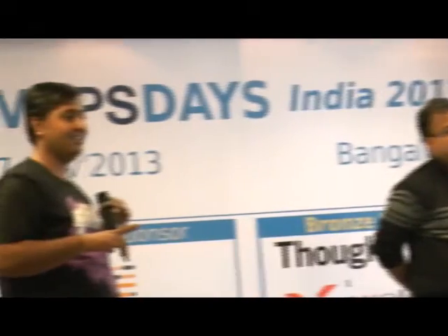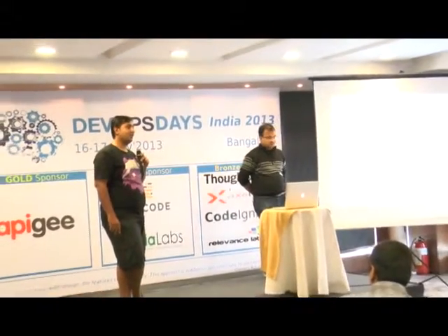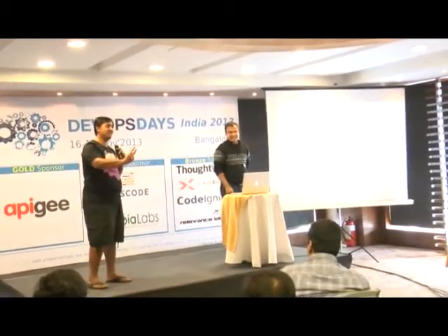We had something like this on a project in our company. Initially it was a small project and we felt it's okay, we can delay the continuous delivery. But it so happens that once it's delayed, it just keeps on delaying. It came to a point where after a year, when the client wanted to close down the project, he wanted to deploy. After a year into development, when everything is stable, the devs are in that state where they feel that whatever I want to keep manually on the machine, I can do it. Then if you try to put in automation, it becomes very difficult because then you have to change the code also.